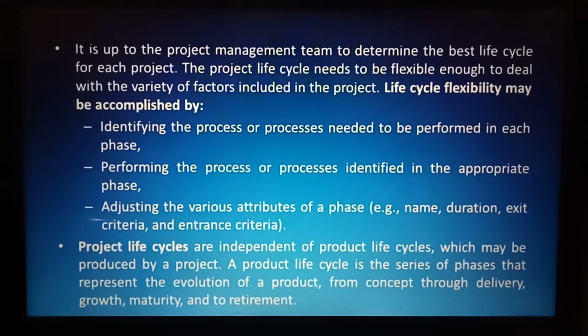The project life cycle needs to be flexible enough to deal with the variety of factors included in the project. Life cycle flexibility may be accomplished by identifying the process or processes needed to be performed in each phase, performing the process or processes identified in the appropriate phase, and adjusting the various attributes of a phase, for example, name, duration, exit criteria, and entrance criteria.